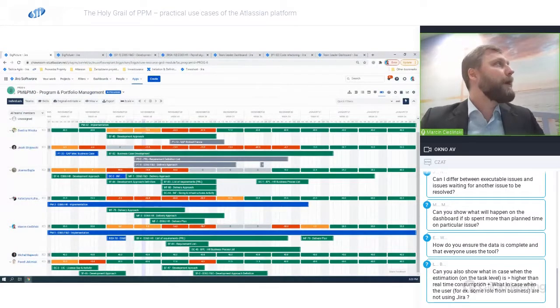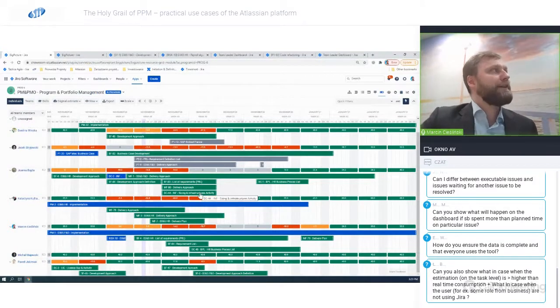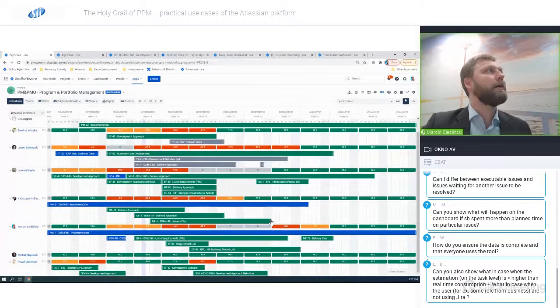So, okay, what I can see is that Katarzyna has a lot of work in week 48, 49, and 50. Well, there are a couple of things I can do. She has actually 4 activities she's working on those weeks. So first of all, perhaps I can prolong one of those activities, and let's see how that helps her. I will prolong the delivery plan, let's say by 3 weeks, by up to week number 52. And as you can see, those numbers have already changed.